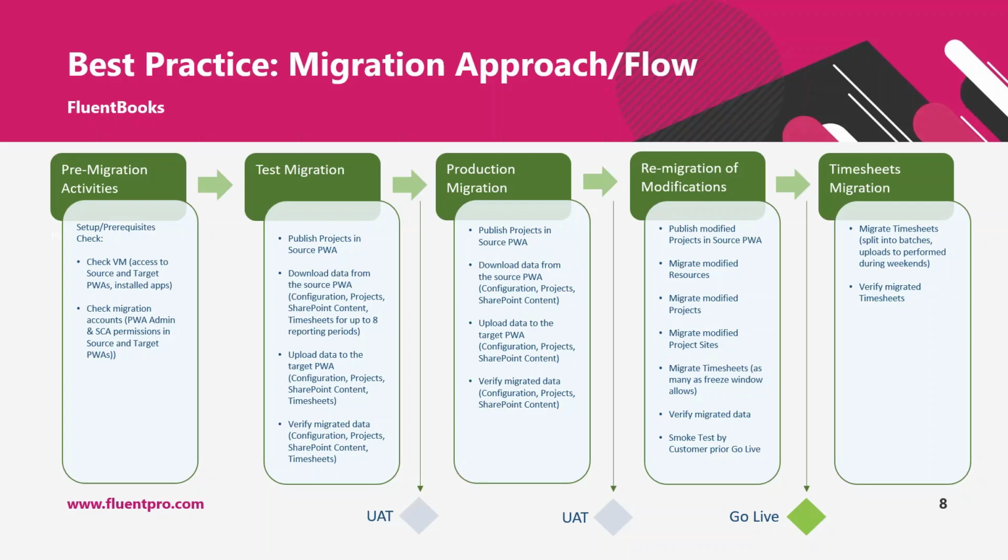So basically, users will not be able to work with timesheets normally when upload of timesheets is happening. So this is why timesheets migration is a bit more special than migration of the rest of the data. And it also needs careful planning to make sure that timesheets are migrated, but users are not affected by this migration.